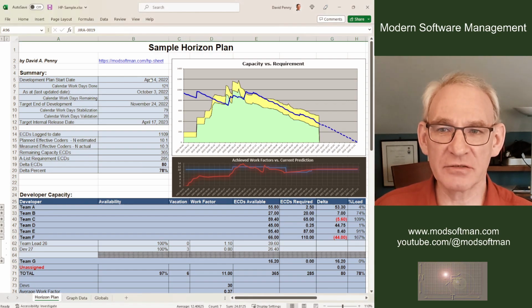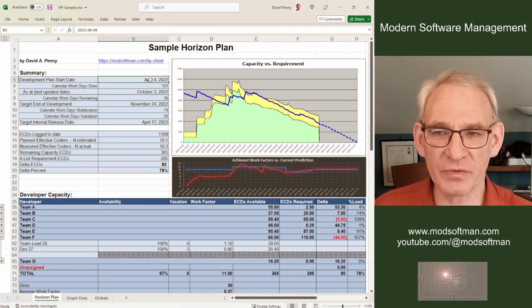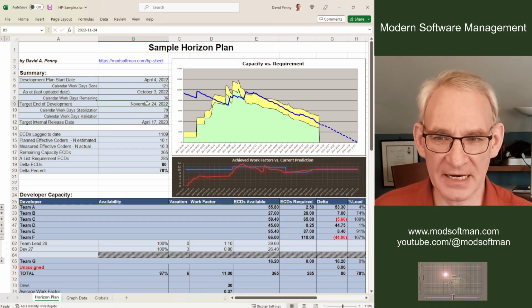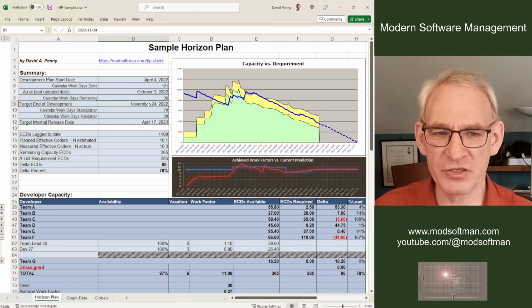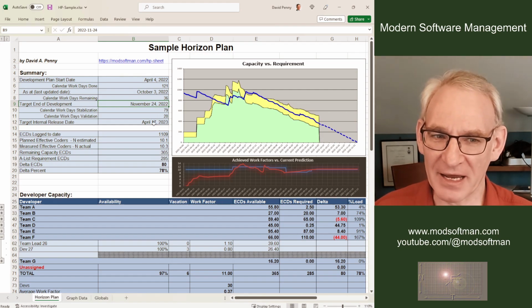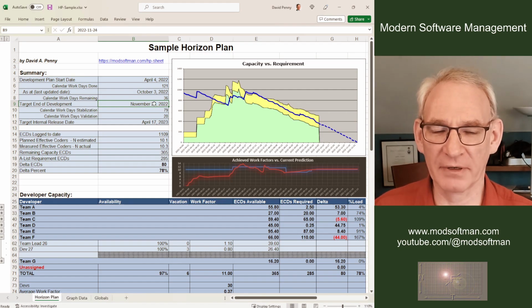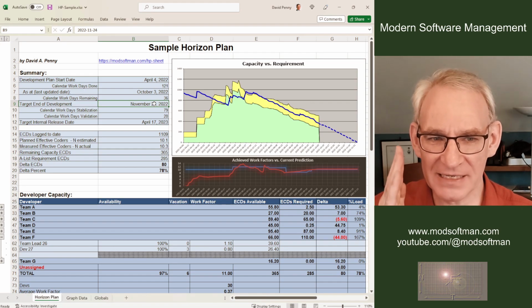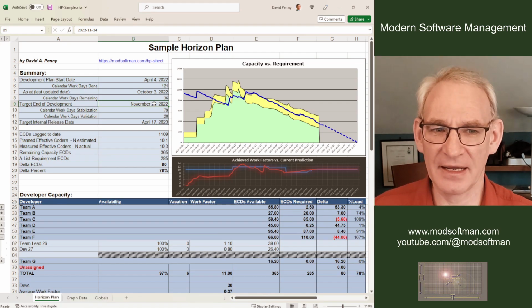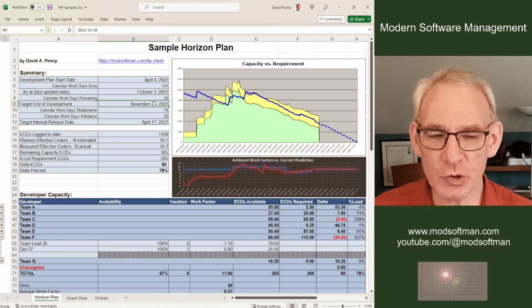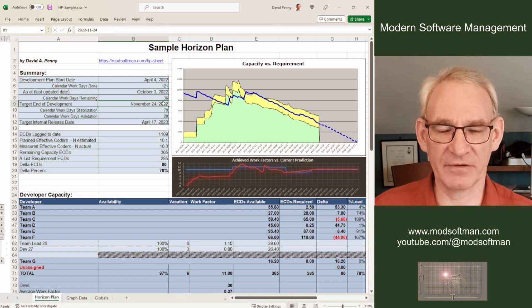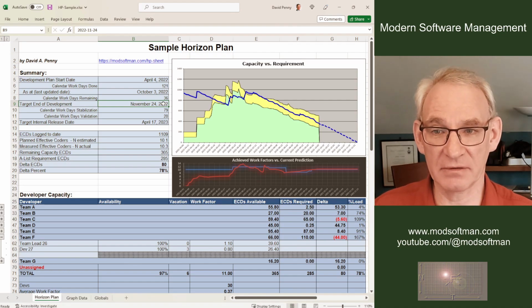We manage quite proactively between start and decut. We almost create an artificial mania around hitting this decut date, even though there's a lot of time afterwards to clean things up. We really try to put an artificial mania on hitting decut. And everyone buys into that. Everyone understands why we're doing that. If it shows any danger, we will take action. We will move dates, or we will move features.